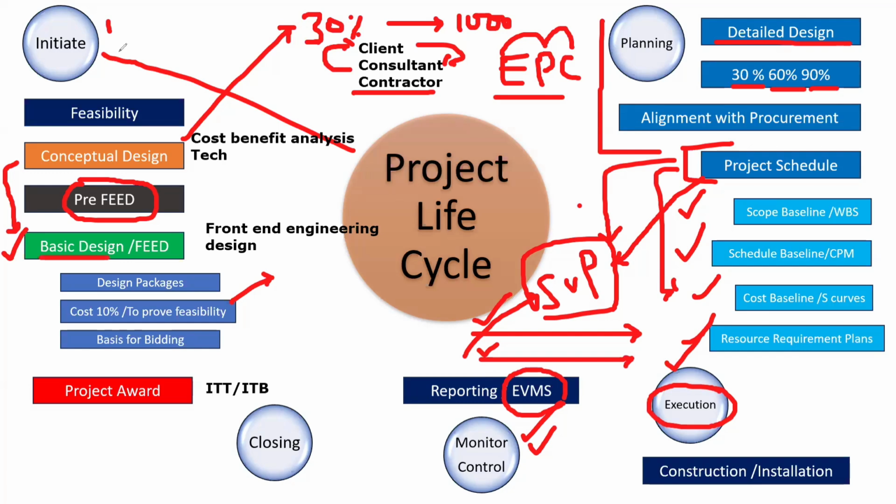And then the closing phase. क्या मतलब closing का? आपका 1 साल का project है. You after 1 year, as per contractual milestone, you are going to analyze कि time complete हो गया project का. If the project is 100% done, then you are going to deliver that project. If project is 70% done, but time is completed, you are going for EOT, extension of time. You are going to claim for extra time. That is another story as well, which will be covered by delay analysis and claims management.